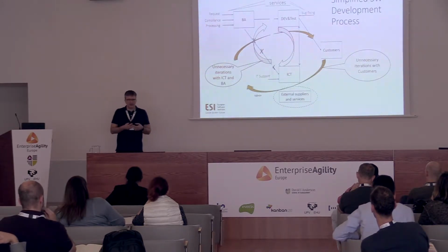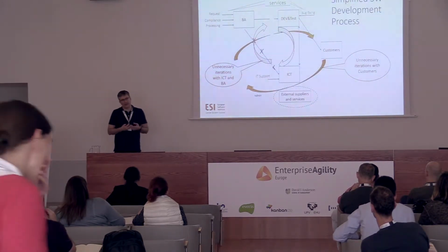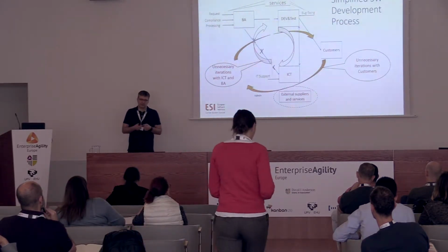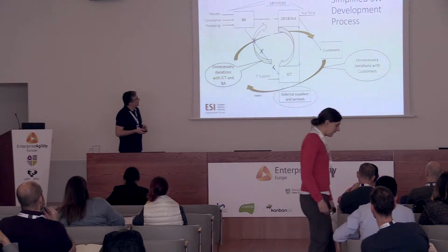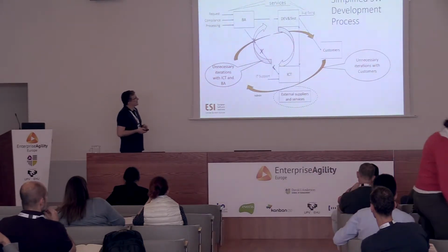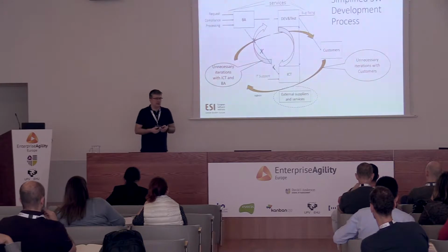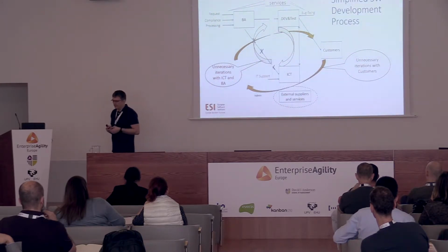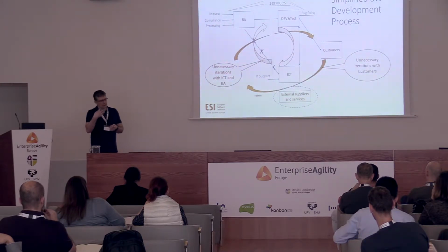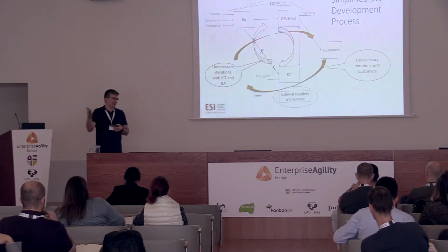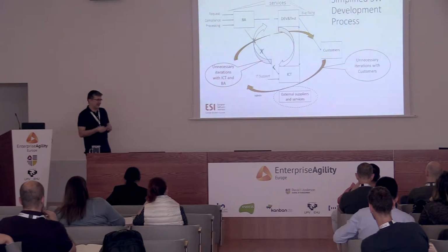We were working with the departments and with the managers in a series of workshops in which we agreed on this diagram of the company. The idea is like this. We have business analysts. They receive requests. Requests are new work that should be done, and it should be above 24 man hours at least. So it should be quite something.